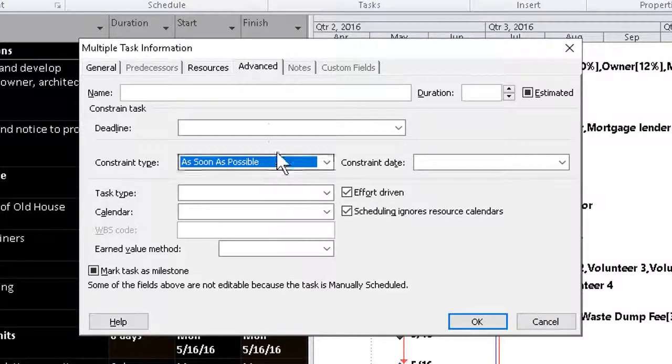We also want to make sure that there's nothing in the deadline space. We really don't need to do anything here other than click and clear anything out. If there's nothing there to begin with, it's fine. But since deadlines may also not exist for future projects, it's important to clear that part out too. We can then click OK.